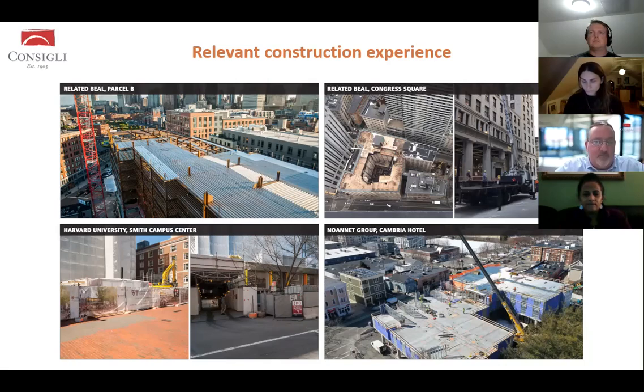In addition, there'll also be a comprehensive traffic management plan, including trucking routes, which will divert traffic away from the neighborhoods. We also have noise mitigation measures, including strict work hours for deliveries as well as for the construction crews. There'll be a dust and erosion control plan to make sure that everything stays contained within the site. And then also, visually the site will be fenced off with scrim. There'll be safety signage as well as a daily cleanup, to make sure that we're being good neighbors throughout.